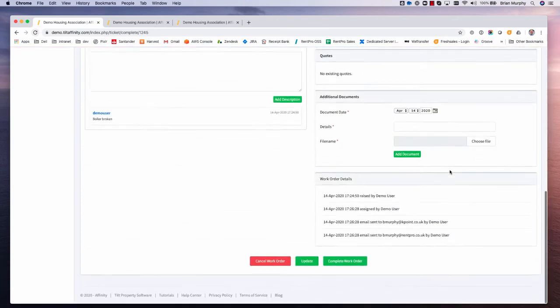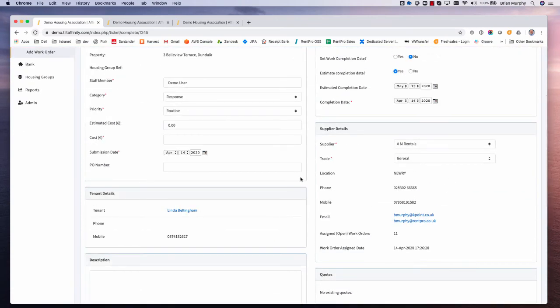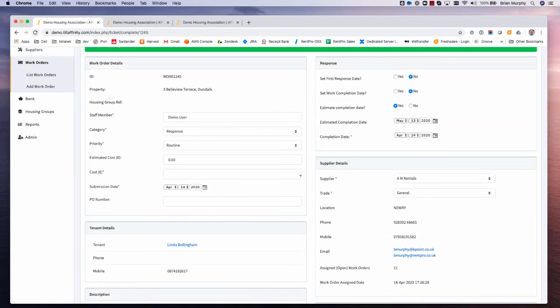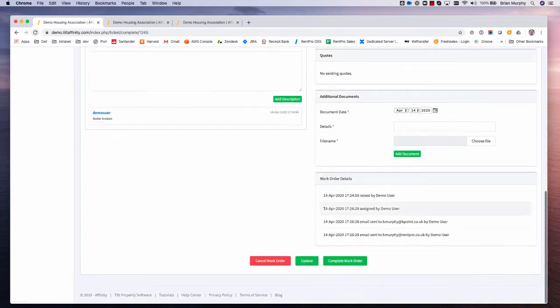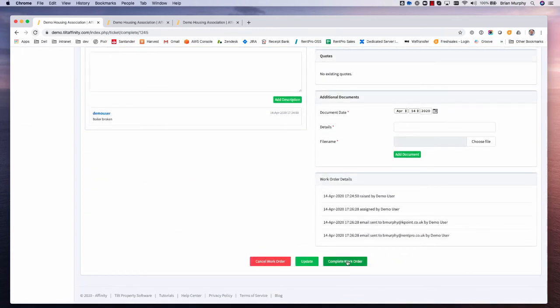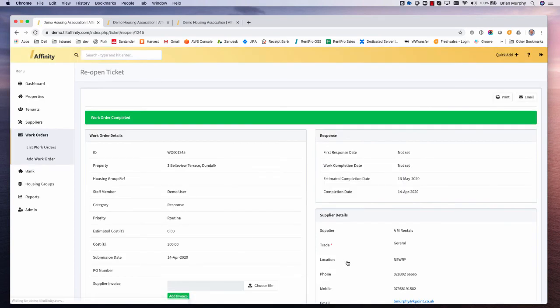state. The final state really is when the supplier comes in and says that work's done, here's my invoice. We have to record the actual cost associated with that bit of work and then just mark the work order or the activity as complete. So we have marked it as complete, doesn't mean we've paid the supplier as yet.